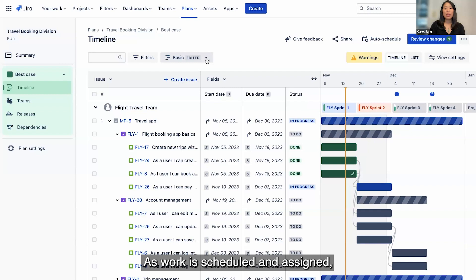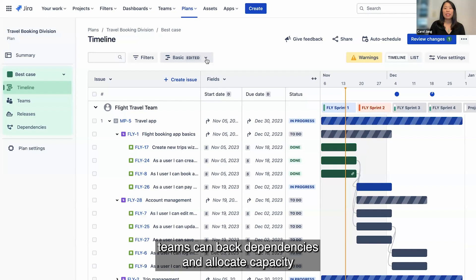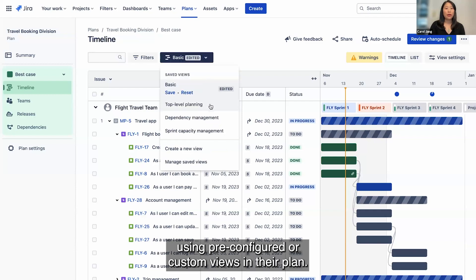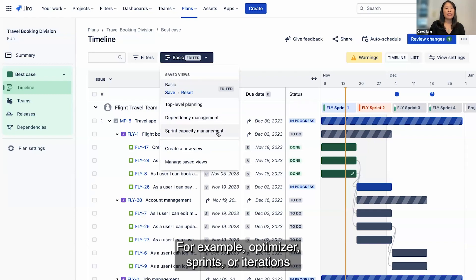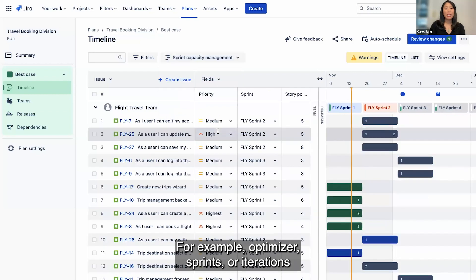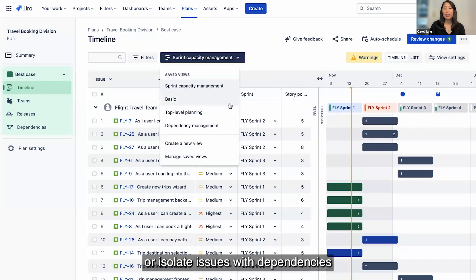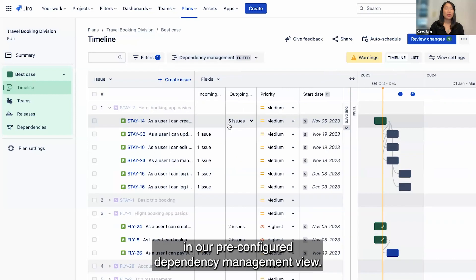As work is scheduled and assigned, teams can map dependencies and allocate capacity using pre-configured or custom views in their plan. For example, optimize your sprints or iterations using our pre-configured capacity management view or isolate issues with dependencies in our pre-configured dependency management view.